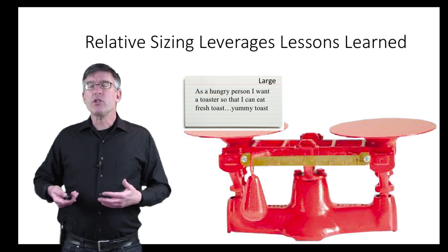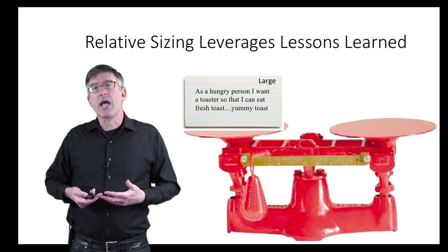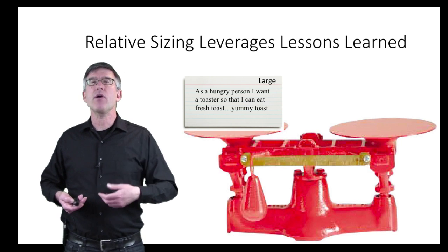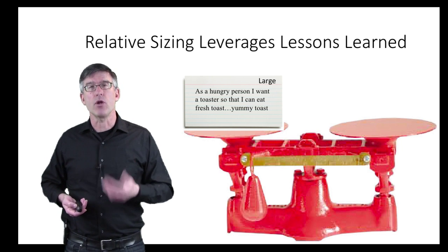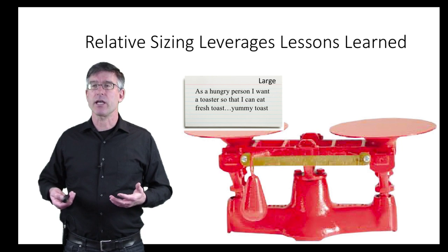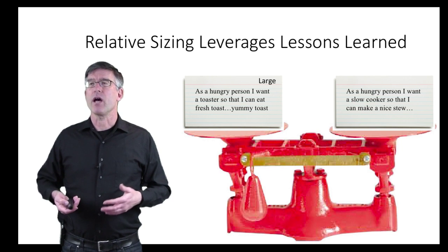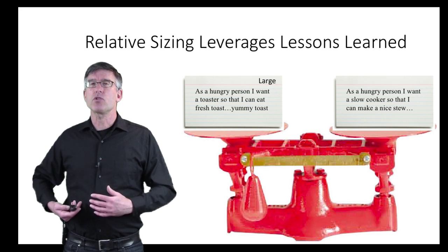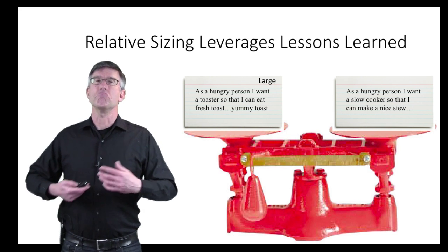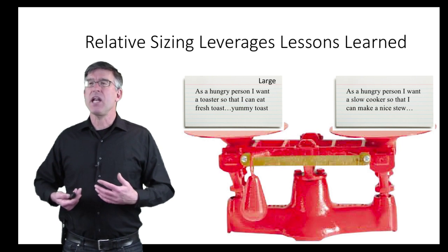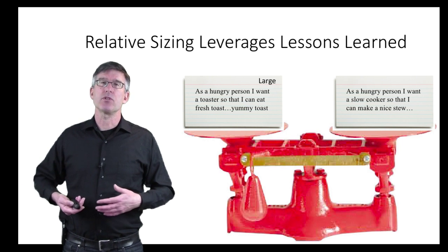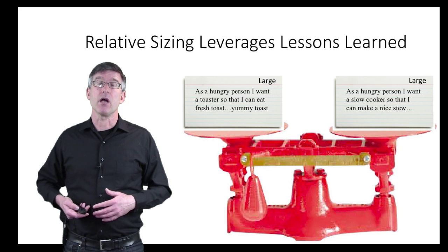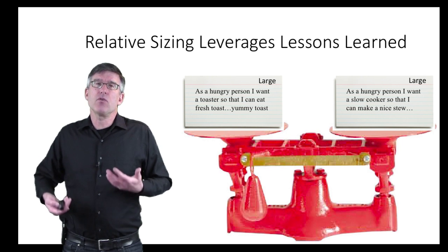So if we want to understand how big something that we're about to take on is, we'll compare it to something that we already have done or we know how big it is. So you can imagine it sitting like on a balance scale here where we have one story and we have this new story. And we ask, is this new story that we have here bigger or smaller? And if it's the same size, the known story we said is a large story, the new story will be a large story. So this is kind of the way that we do it.